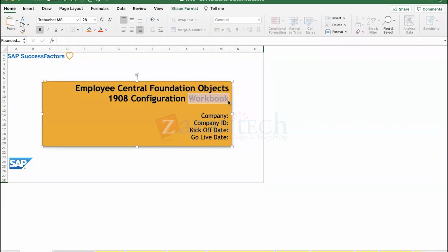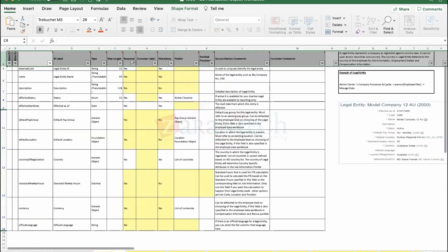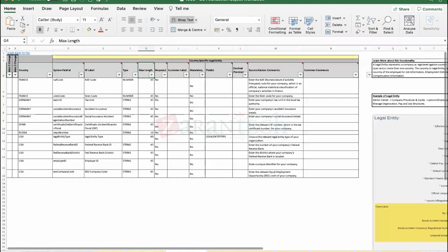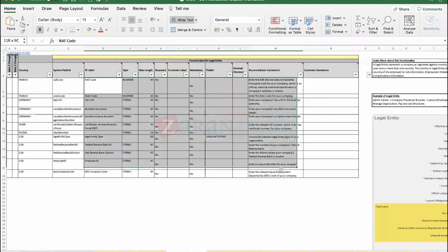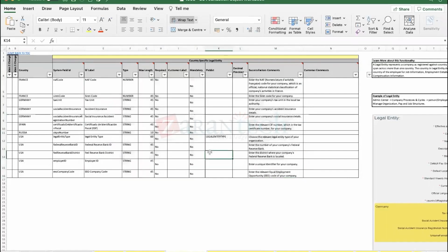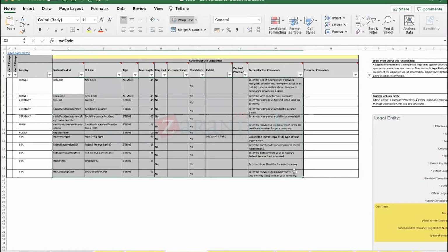We'll be downloading them from SAP's website, and we'll be filling this in front of the customer, where I go through each and every Excel sheet, every sheet in this Excel, in front of them and explain what each of them means. So if there are any changes they are not okay with in the standard delivered, then and there itself we'll record the changes. When the configuration time starts, as per the changes that we have recorded, we will make all that in the system.